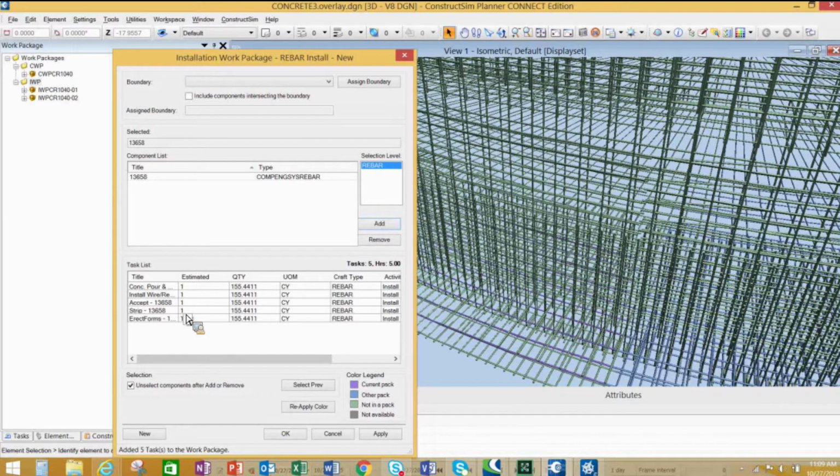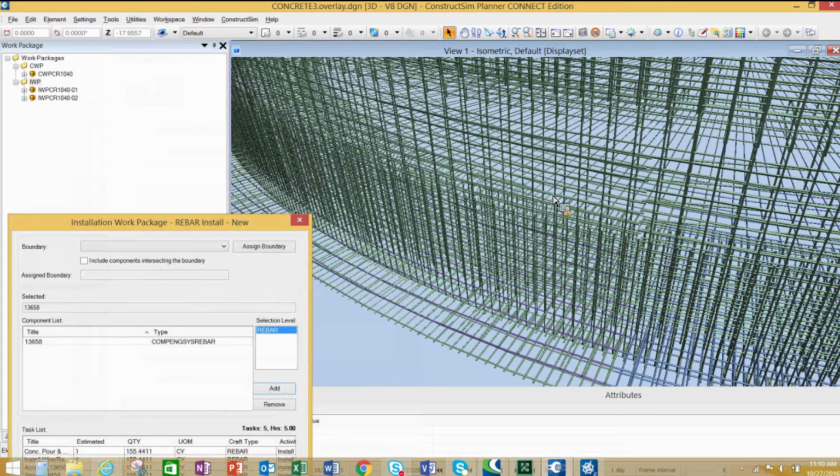You may ask, well, why is this really important? The reason this is important is because you can take your project controls information or your task information for building rebar or concrete, how that's laid out, and then associate hours or units with it to be able to see exactly how long it'll take you to install that particular task. Now for here, we just showed it as a one-to-one, so we're showing 5 tasks and 5 hours to do that task. So I'm going to go ahead and complete this.